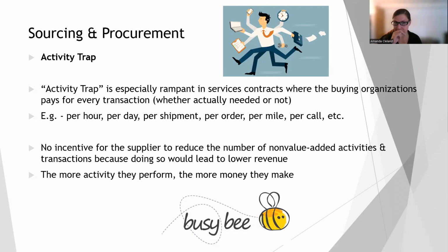So what that means is that there is absolutely no incentive for the supplier to reduce the number of activities that they're performing. Because if they did that, that would lead to lower revenue.